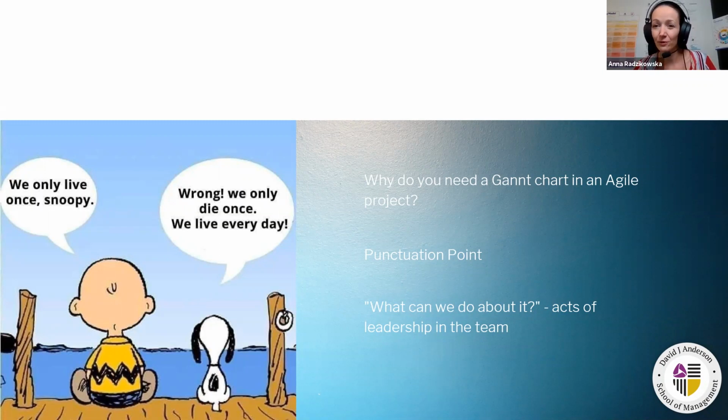We had some timeline for this, more or less 1.5 to 2 years to implement this tool in the finance department. And we had very high level requirements. We were just told, guys, there are 15 reports that we do manually, and we want you to automate them. And we as a development team and testing team, so let's call us delivery, were a group of totally new people, not working previously together. So what we had to do, first of all, was establish the whole project and how we are going to create this product, but also we had to create some kind of chemistry between all of us.